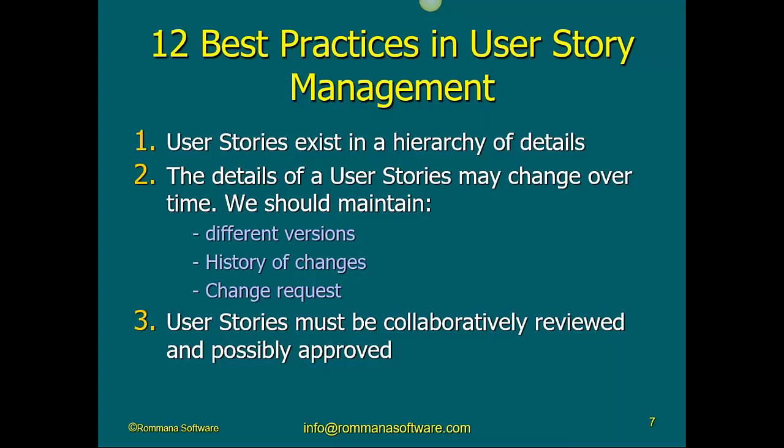When things change in our life, we keep track of the history of the change. If there are any details about a user story that have changed over time, don't you want to know what has changed about the user story, and when, and who suggested the change, and why, and most importantly, what is the impact of that change on other user stories? This is the classical stuff about change management, which we have learned for years, and somehow we suppressed all that when it comes to user stories.